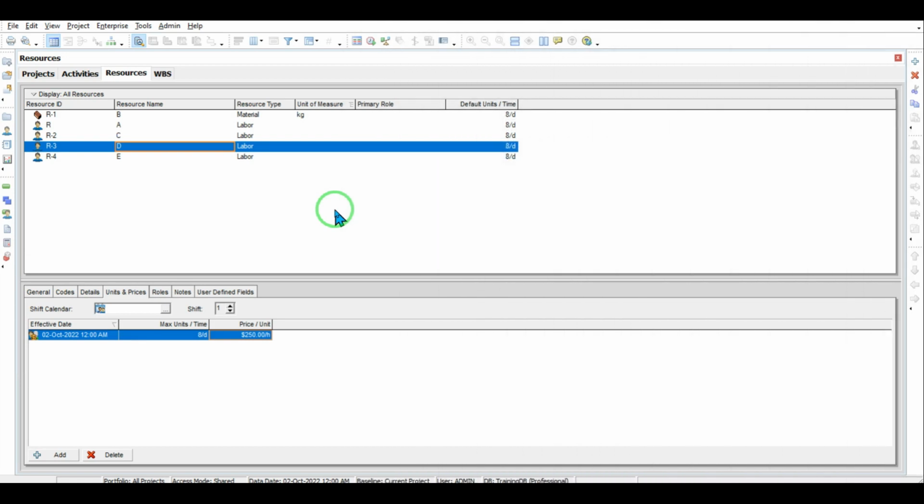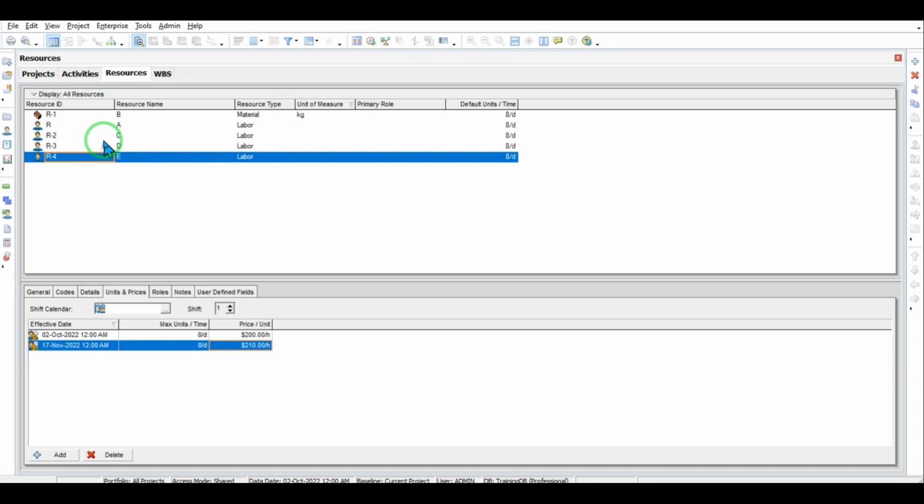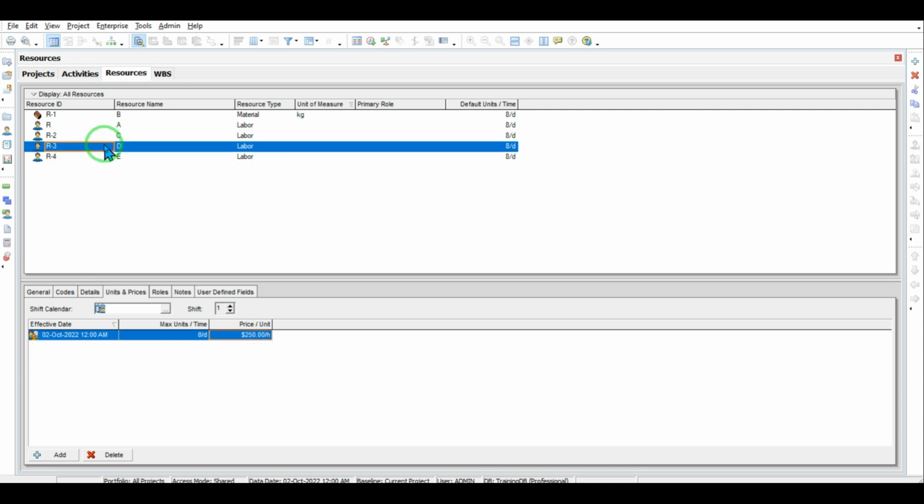There is something missing here, and that is nothing other than the resource calendars of resource D and resource E. Because it was stated that resource D is available only on one day, which was Tuesday. However, resource E was available on 2 days, which were Tuesday and Wednesday. In other words, for resource D and resource E, we have to define 2 different calendars and then change them.